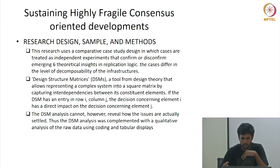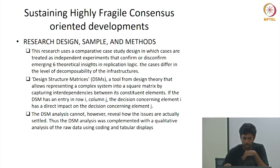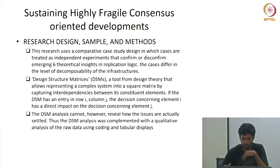The Design Structure Matrix (DSM) is a tool from design theory that allows representing a complex system as a square matrix by capturing interdependencies between its constituent elements. If the DSM has an entry in row i, column j, then the decision concerning element i has a direct impact on the decision concerning j. The DSM analysis was complemented with a qualitative analysis of raw data using coding and tabular displays.